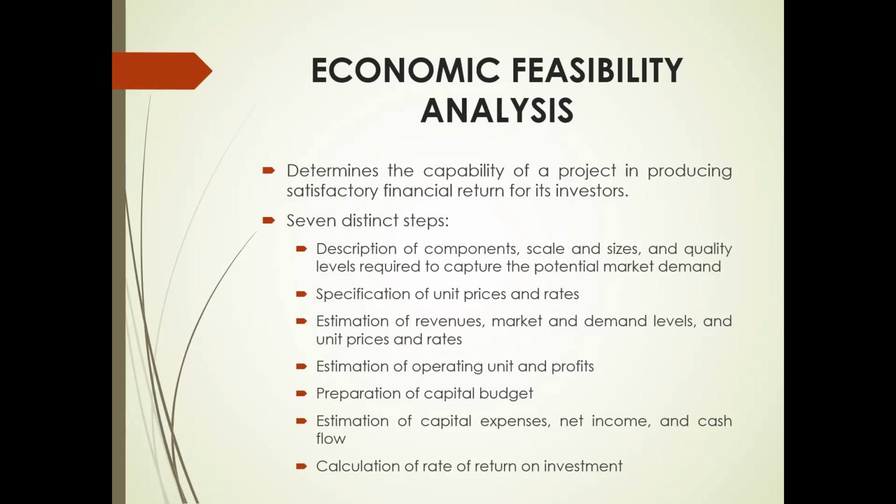These include financing charges on long-term debt, depreciation, municipal taxes, and insurance premiums on fixed assets. With these expenses, net income figures and cash flow forecasts can be made. The net income and cash flow projections generally cover the useful life of the project, which for most tourism enterprises does not usually exceed 15 to 20 years of operation. Then the final step in the process uses one or more financial techniques to measure the rate of return produced by the forecast net income and cash flow levels.